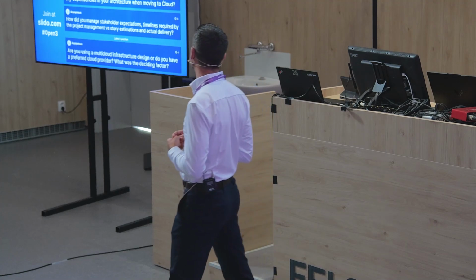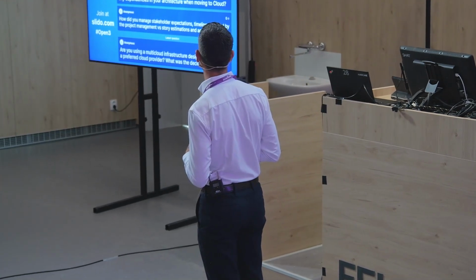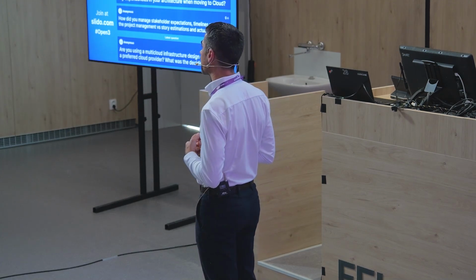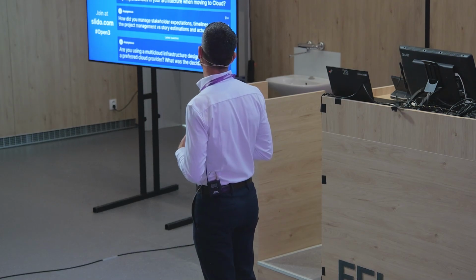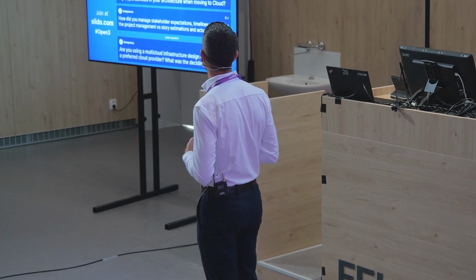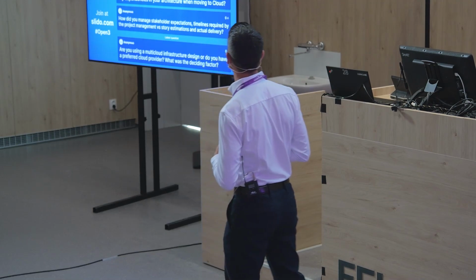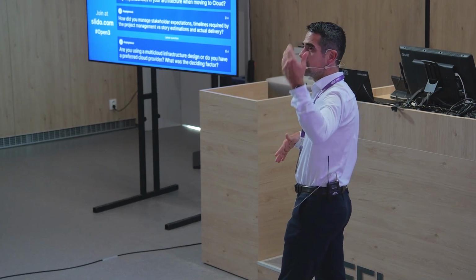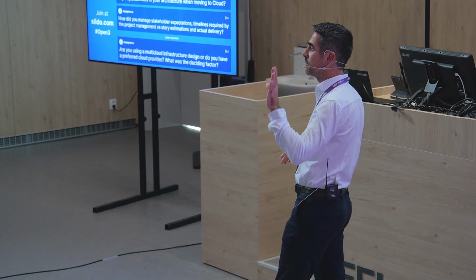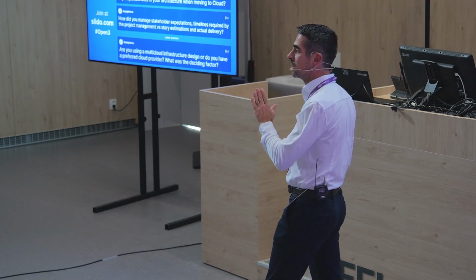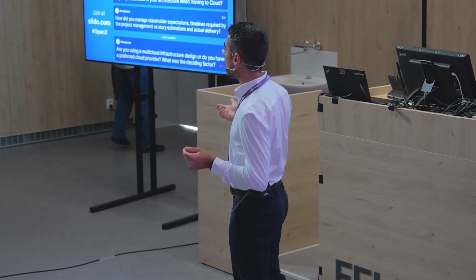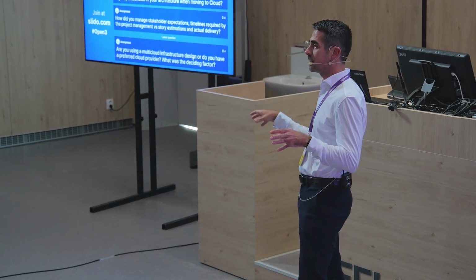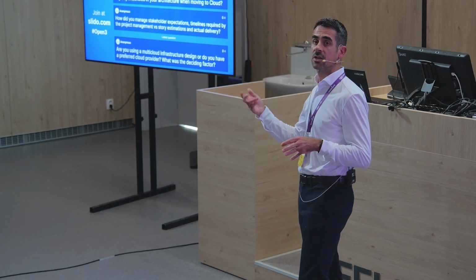What was the decision process when dealing with legacy and any dependencies in your architecture when moving to cloud? I think it can be from private and then to public, both, not specified. Yeah, this has different implications. I think dependencies is maybe the easier one. Once you look at the whole landscape proactively, then you start putting the pieces of the puzzle together on what you're moving first. And where we have common dependencies on a single platform, we make sure that all the elements are out by the time we need it to realize the financial benefits, for instance.